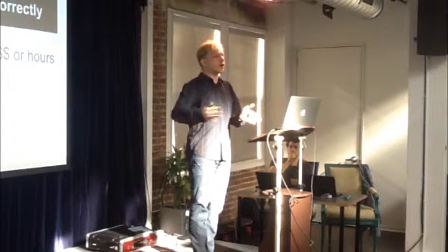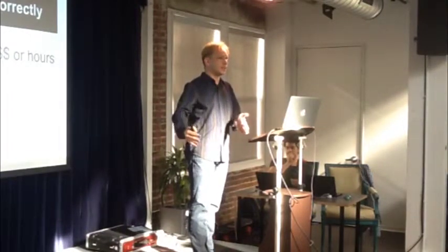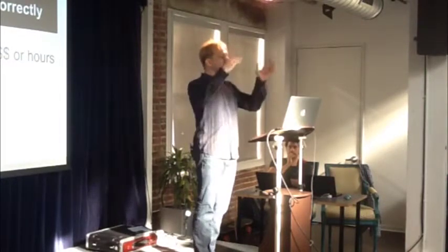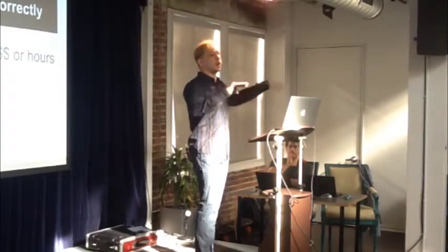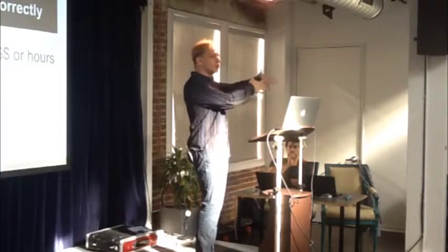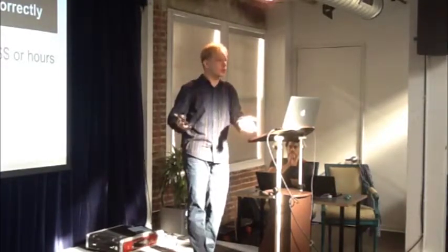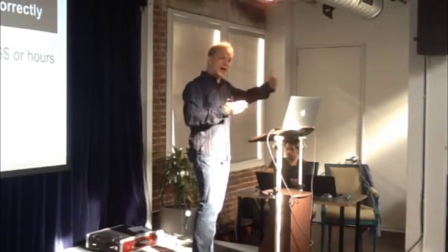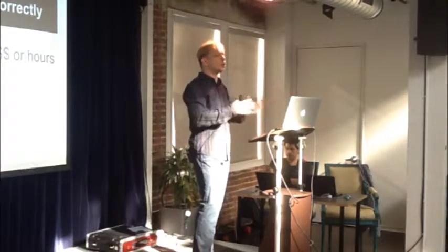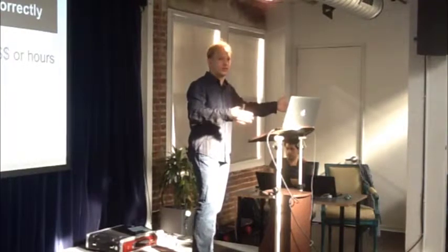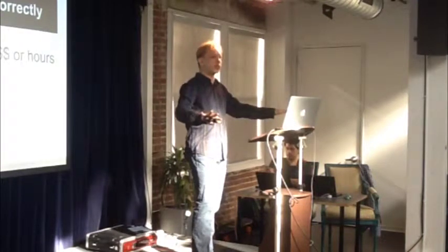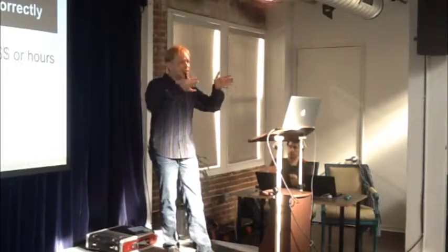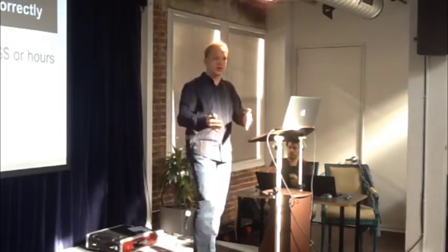You use these to evaluate the cost of software features, and then you have a team leader on the developer side estimate all new features based on comparison of complexity to past features. You know what, we called this one a 3-point feature last time, this is pretty similar, we'll call it a 3-point feature this time. Then, at a different time or even by a different person, you look at past iterations and see what the total spend per point was. That separates money from estimation, and you end up getting a much more accurate estimate because you're not forgetting all the things that might go into the final dollar cost of a feature.